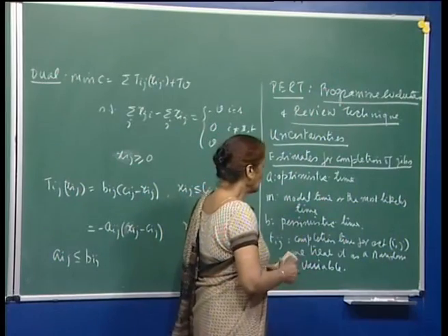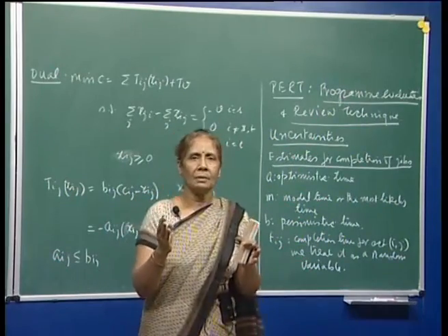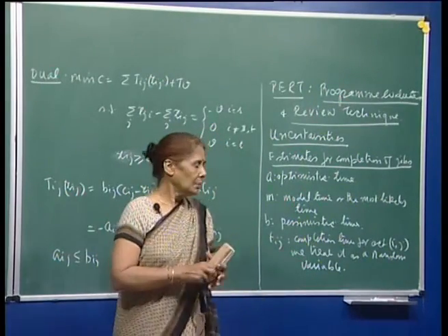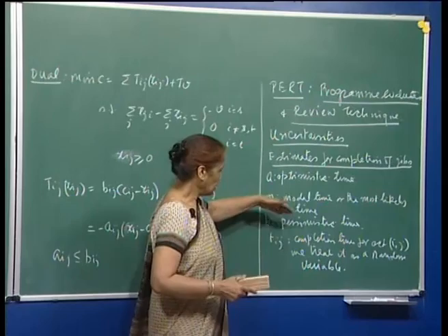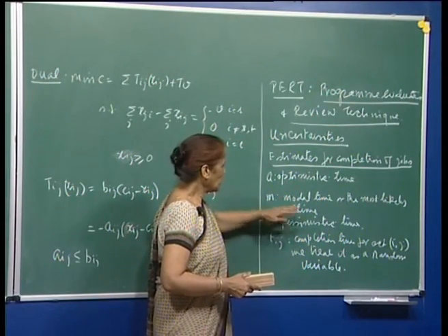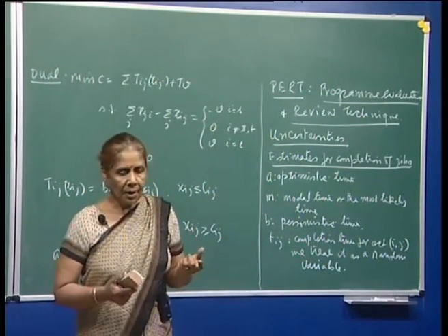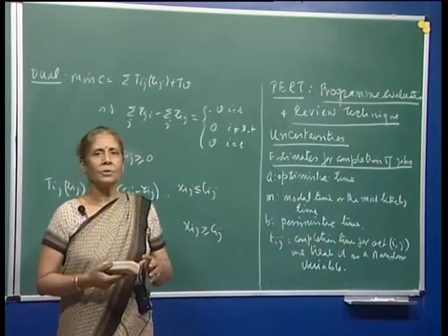Unimodal means that it does not have more than one hump, and it is not symmetric. It is continuous, not symmetric, because the activity does not have to take integer values and so on. Therefore, you are looking for a density function which has a finite range, unimodal, continuous, and not symmetric.